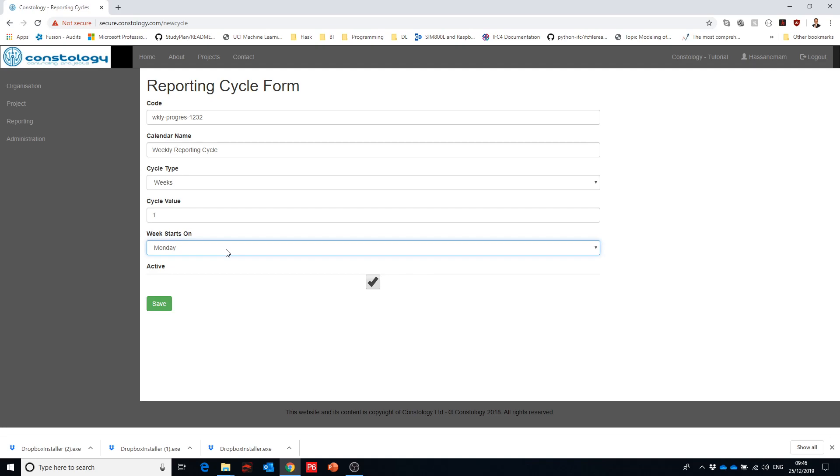Why this information is important: because when you will set up your project you will have a start and finish date and then it will create reporting periods. And these reporting periods will be used later on to reduce your look-aheads, your weekly work plan, and everything would be driven from these dates.